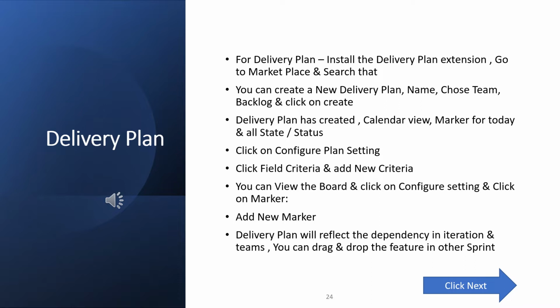When we are working on a delivery plan, it helps to identify the dependencies on the team, and based on that it provides a highly interactive calendar view of multiple teams' backlogs. To work with a delivery plan, we need to navigate to Boards and then click on Delivery Plans. We'll also see this in the next slide.